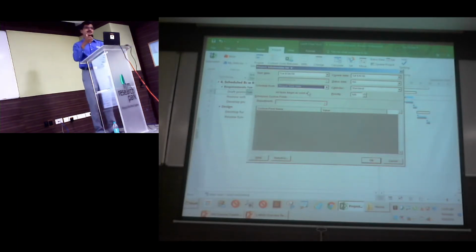Okay, and generally backward scheduling is used if you want to provide a rough estimate to your customer. Customer might say by end of December we want 3 projects to go live. This is the budget. What is the likely date we need to start? So you have given a finish date, now you need to go backward to calculate the start date. Maybe from our context, but I don't see in any of our projects we go for backward scheduling.